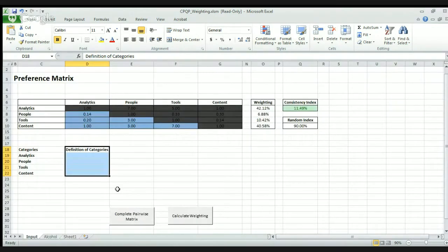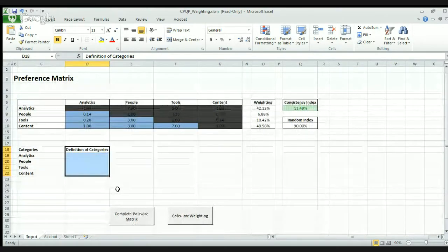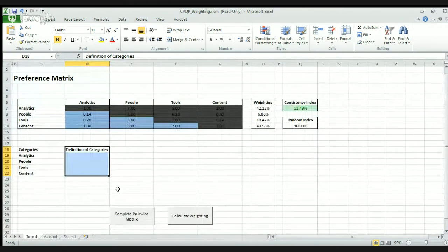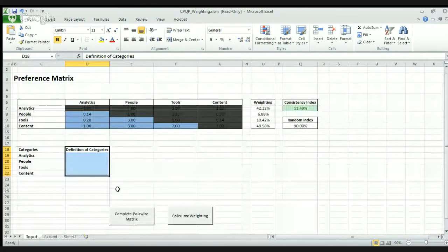So there's no averaging in coming to these numbers, which again was a variation on what you provided. Typically, I don't do averaging. I make everybody come to consensus and talk through disagreement on the front end. And the simple reason for that is that, in the instance where Andrew and Greg are disagreeing, the end result's going to make one of us happy, right? And I would rather not have the other one hate me. I would rather the other one understand the decision that's made, feel like they had a say in it, and that the team made the decision, than having Greg mad at me because we went Andrew's way.